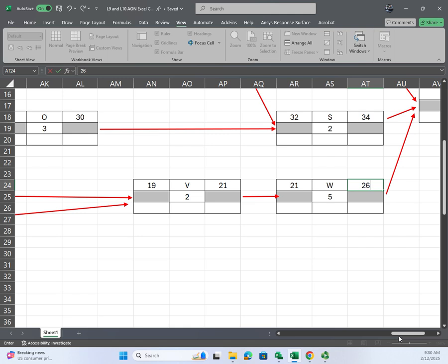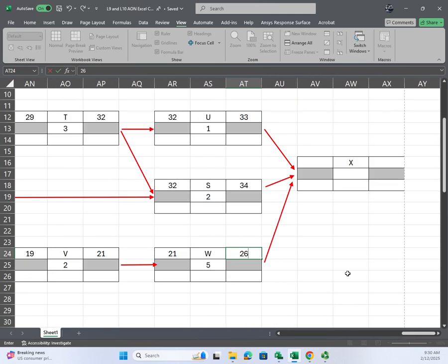Okay. Now we are back to the right, I mean, and the longest time before we can start X is 34, right? Duration on X happens to be 0 because it's the end, which is really stupid they did this. And then whatever the early finish is on your last activity, it's always your late finish also. Okay? So it's 34, not 364. And we go back 34.